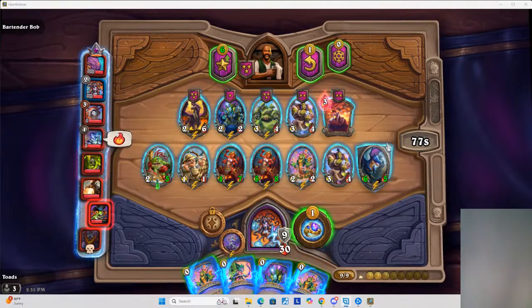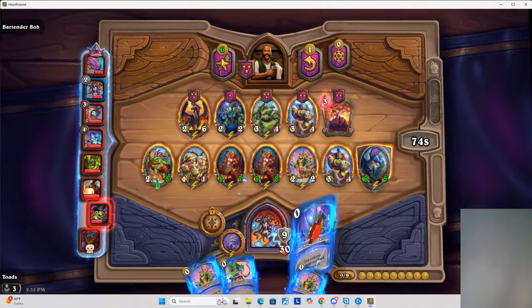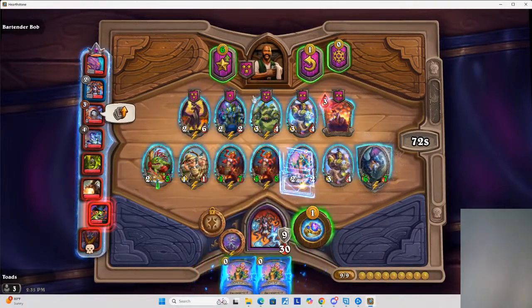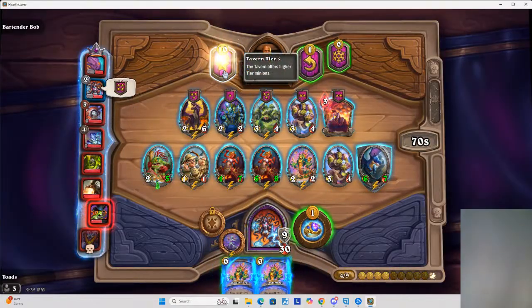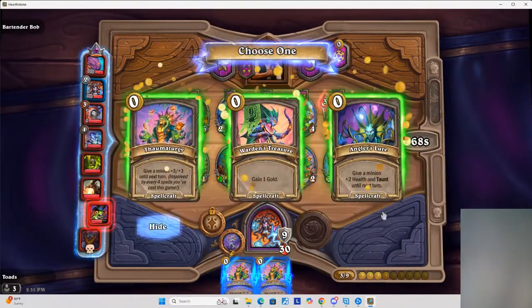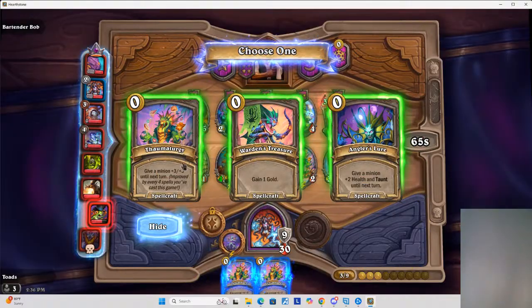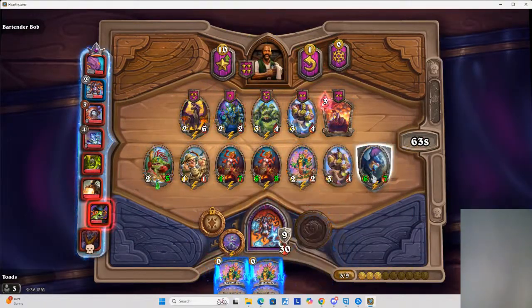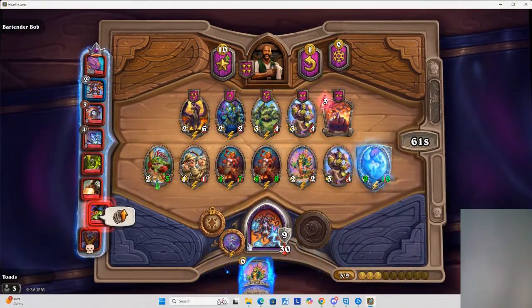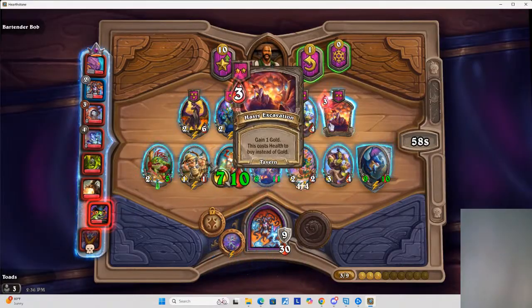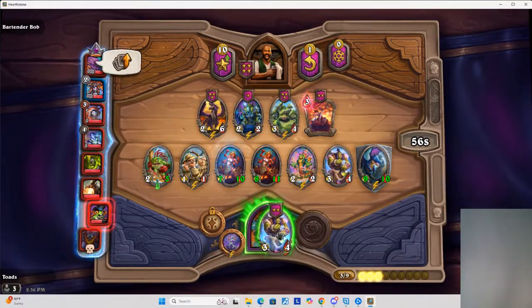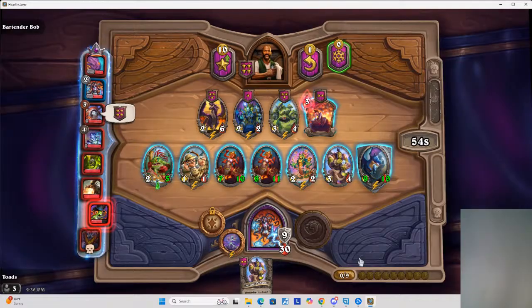Focused on what needs to be done and discourage people from doing more than is required. If someone wants to add something to the project, you can use the scope statement and project objectives to decide whether the addition makes sense. On the other hand, if you run into trouble with the budget, schedule, or availability of resources, one option is to reduce the project scope. Add the scope statement to your project definition. You'll use it throughout the project to help keep it on track.